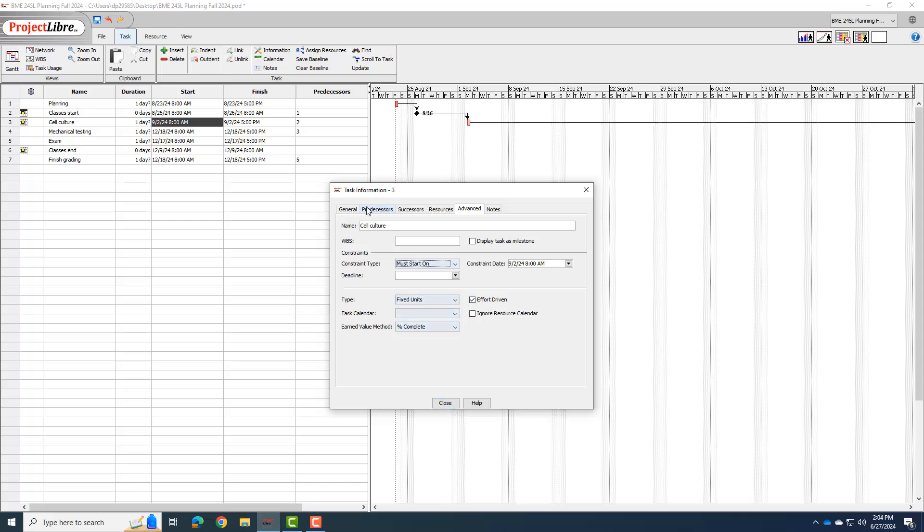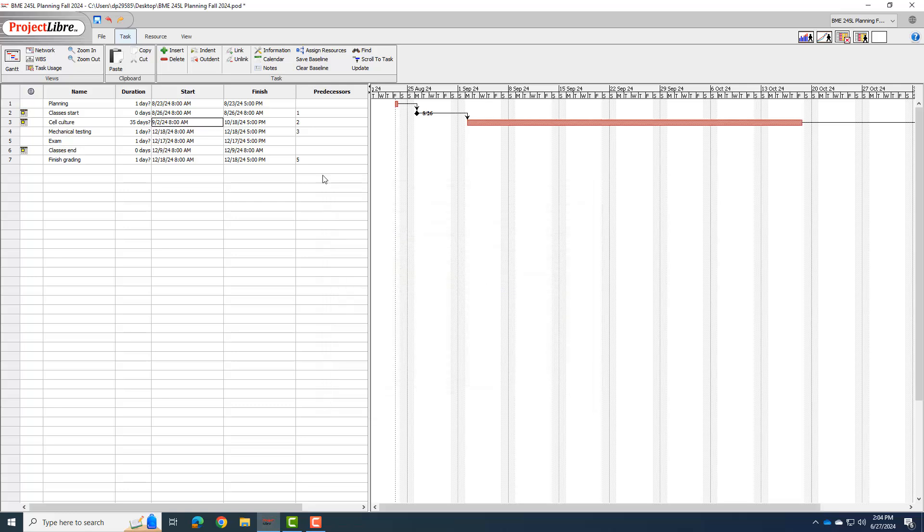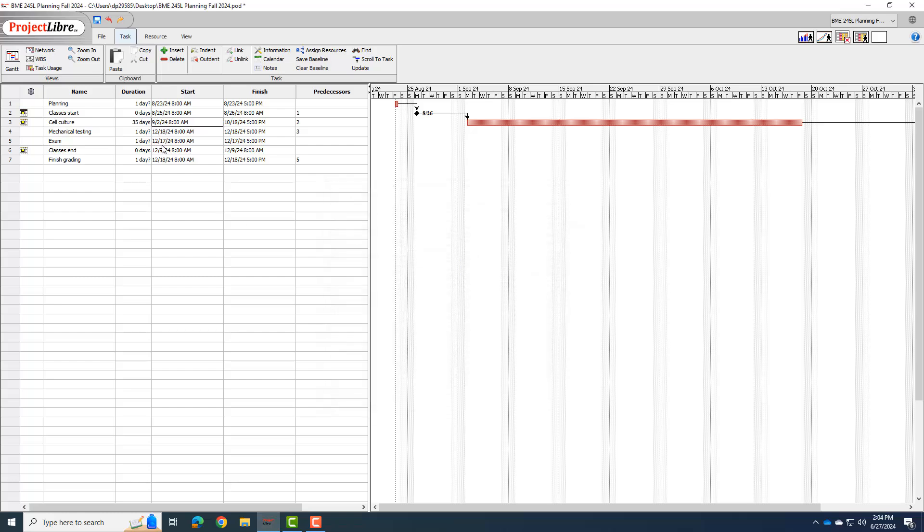Okay, and then I can set the end date. So I'm going to go to general, and I can set the finish date to be what it's supposed to be, which is 10-18. Okay, and so you can see it showed up in the Gantt chart there. One thing it does, it still has this question mark between, for the 35 days. So I'm going to double click that, and instead of just letting it have a question mark, I'll unclick estimated, and it will get away the question mark and tell us that's 35 days of work between 9-2 and 10-18.